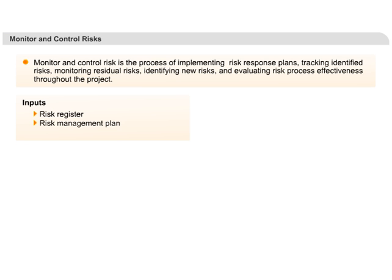The inputs to this process also include the risk management plan and performance reports. Performance reports are inputs because, in the form of an earned value analysis, they give an accurate status of the project's health.